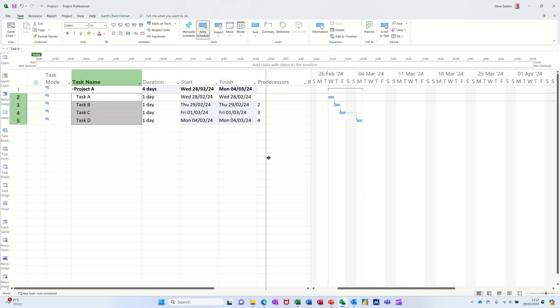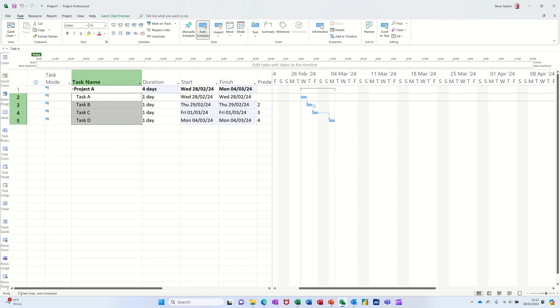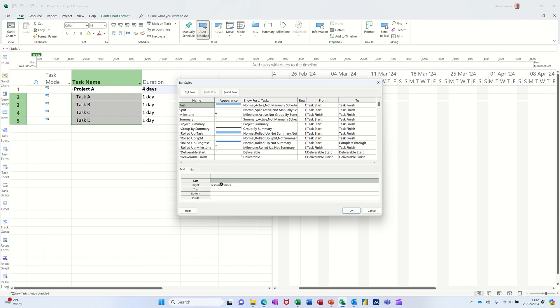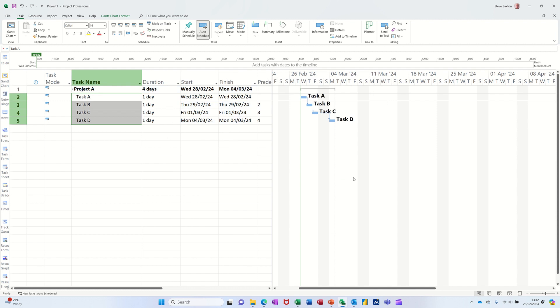Now on the Gantt chart itself it's a bit spartan — you can't actually see what these tasks are. But if you double click on the white area you can come into this box, bar styles. One of the features in here is to put the names on. At the moment resource names are there. If you just over-type that with the word 'name' — which actually means task name — it will put the actual task names on the Gantt chart for you like that.